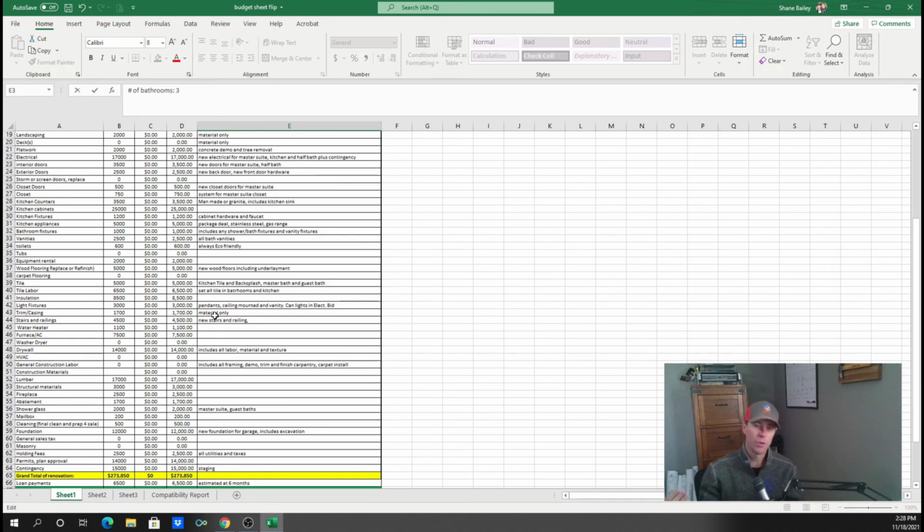And trust me, yes, you can trick yourself into taking numbers out and making it look really enticing. You can talk yourself into any deal. You can talk yourself out of any deal. But the bottom line is you want to make sure the number's fair, but a little aggressive on the high side. Once you get through your full budget, your real budget, that's once you're under contract and you can start walking this project with subs, with engineers, whoever else you need to bring in. Get that number down and then figure out due diligence wise, does this truly make sense or not? How far above this cost am I? Can I make it work? And then you go from there.